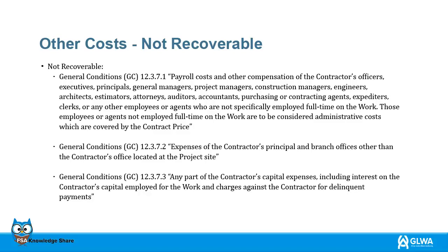Those employees or agents not employed full-time on the work are to be considered administrative costs which are covered by the contract price.